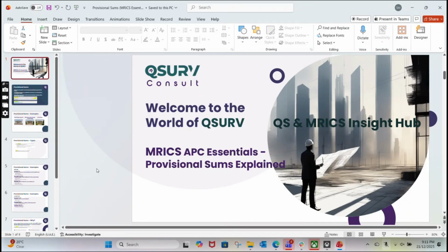So, 5 million to 7 million, in a simple way. In the first case, if you have any chance for design optimization, you look at that, if you have enough time. Consultants normally tend to consider superior designs, so you can optimize that as a first option, subject to time availability. But again, the 5 million is based on what? Are you wrong, or is he overpricing? That's the first key issue you look into.